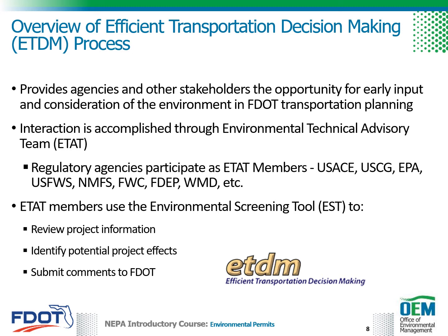This includes representatives from the U.S. Army Corps of Engineers, U.S. Coast Guard, Environmental Protection Agency, the U.S. Fish and Wildlife Service, the National Marine Fisheries Service, the Florida Fish and Wildlife Conservation Commission, the Florida Department of Environmental Protection, water management districts, and others. ETAT members use the Environmental Screening Tool, or EST, to review project information, review preliminary alternatives, identify potential project effects, and submit comments to FDOT.